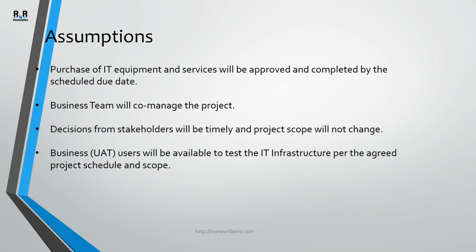You also want to make sure that you're making an assumption that the decisions from the stakeholders will not take a whole lot of time and that they'll be timely. And I mean timely here from a standpoint that they cannot sit on requests in terms of approvals for a long time. Otherwise, that can introduce delays.